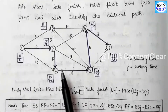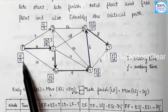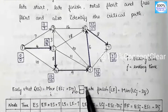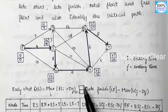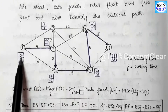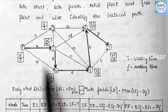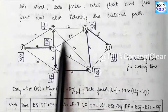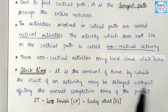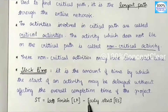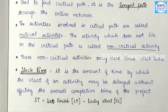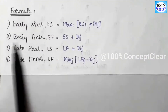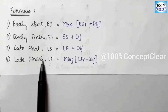In CPM, there are four time values. Early Start (ES) is equal to the maximum of (ES_i + D_ij), where i is the starting activity and j is the ending activity. Early Finish is Early Start plus duration. Late Start (LS) equals Late Finish minus D_ij. Late Finish is the minimum of (LF of ending activity minus duration).